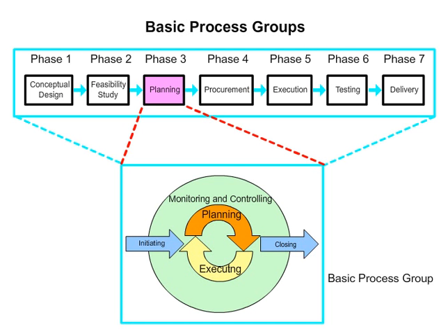2. Planning processes. Refine and detail the project scope, keeping in mind a good balance of constraints, such as quality, time, and cost. Make a list of the work involved, tasks, activities, until the project reaches its goal. Prioritize activities to maximize work efficiency. Create a schedule and budget for allocating resources to the activities required for execution of the project. Obtain proper approval from stakeholders.